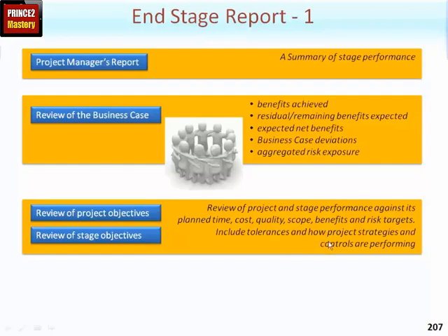And also, very importantly, how the project strategies. Now, do you remember in the PID we had the 4 strategy documents which were created? This is a review of how they are performing. To put another way, are they still appropriate? Are those strategies working? Indeed, do the strategies need to be modified in some way? For example, the amount of formality possibly in the communication management strategy. Is that still appropriate, and is it working?